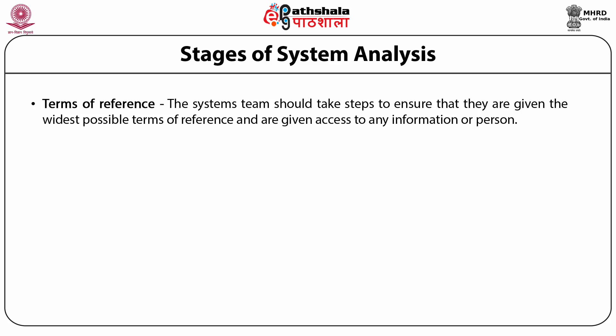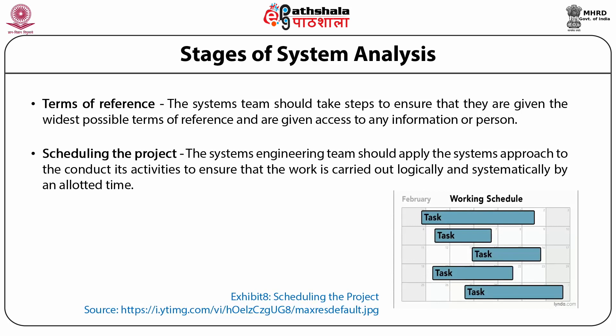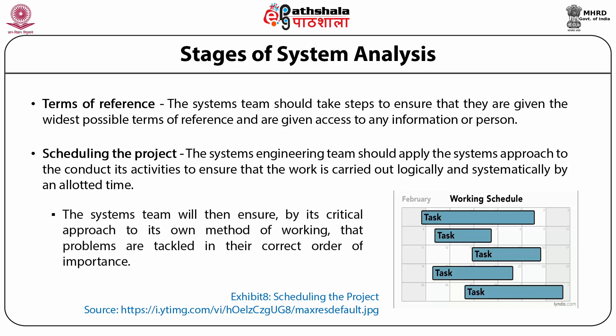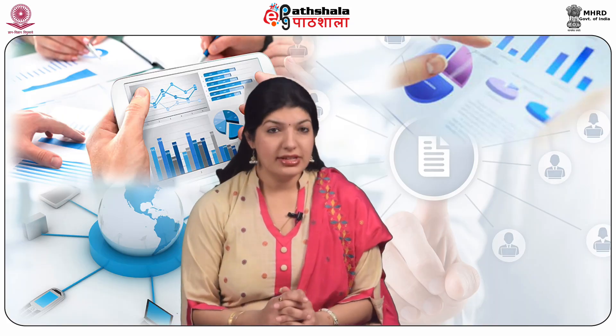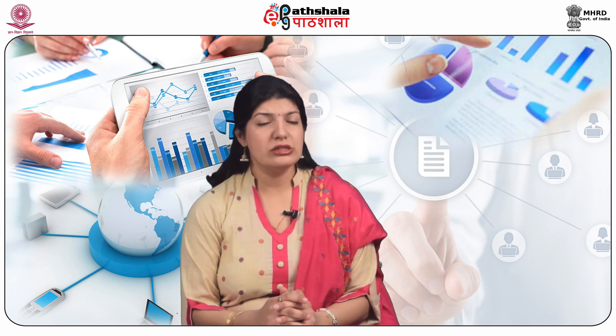The third step is scheduling the project. The system engineering team should apply the system approach to conduct its activities logically and systematically. A decision network should be constructed — for example, a critical path schedule — then targets should be set and duties allocated. The system team will ensure by its critical approach that problems are tackled in their correct order of importance.